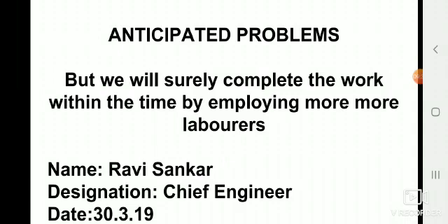I will just once again repeat the format. First, after giving the question, you have to start the report by writing the title. Second one, you have to write terms of reference. Third one, work completed to date. Fourth one, work in progress. Fifth one, work yet to be completed. And last one, anticipated problems. Hope you might have understood.